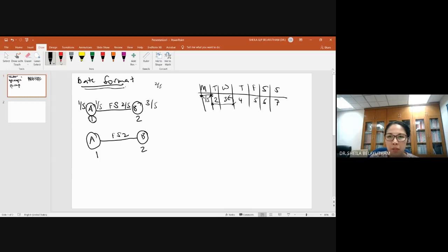Okay, so coming backwards, you finish on the 3rd, so late finish here. It shows the late finish. Minus 2 days, you want to find the start, right? So it shows the start of 2nd. Okay, so if you start on the 2nd, the prior activity is finished. So you're landing at this line here. It shows the finish of 1st. Minus 1 day, so you land here, it shows the start of 1st. Okay, understand?